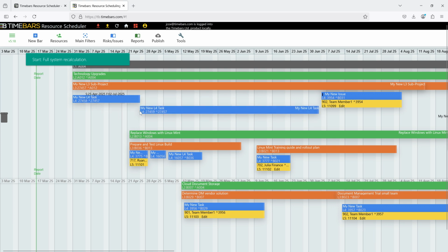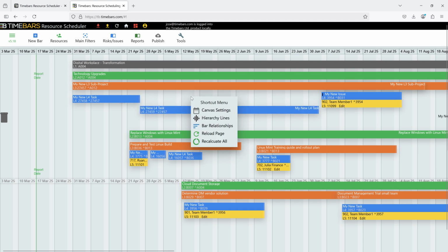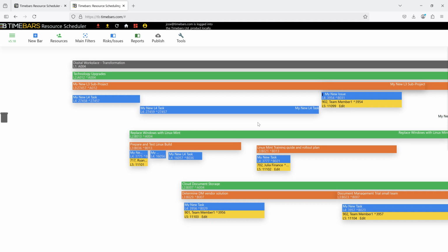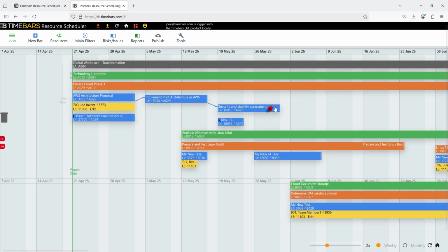You literally draw a line between tasks on the screen to show, this task has to finish before that one can start. Oh, nice. That visual linking is, well, it's a huge advantage compared to tracking predecessors in a spreadsheet column. Right. I've been there. It gets messy. Tell me about it. And it mentions automatic adjustments too. Right. What happens there? If you reschedule a task, say, push its finish date out, any tasks that depend on it automatically shift later too. Okay, so it maintains the logic. Saves a ton of manual fiddling. Exactly. But importantly, you can override that.